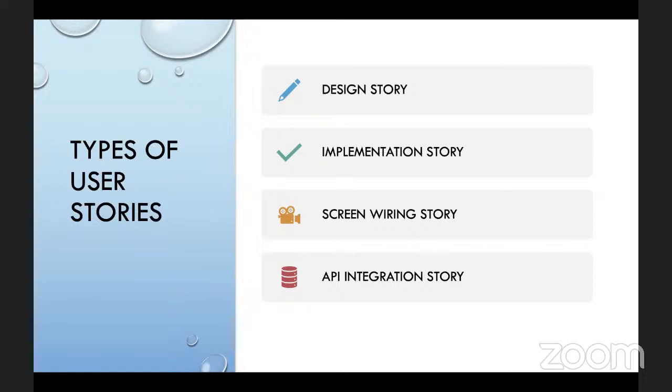So what is going to happen here is that you will inject this design story or design card into the implementation story, right? You attach it like you're attaching a picture into the story that you write for the development team, so that they will not just read your story, but they will have a UI/UX design that is like the vision for them, right?